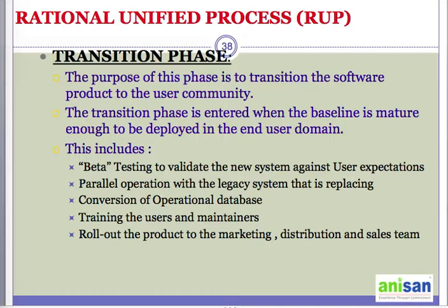Then we talk about the conversion of the operational database. What do you mean by conversion of operational database? Basically, if you are migrating the database, then you may be required to go through this process. Then the training of the users and maintenance. This is basically way before the transition. You may have to provide the training to the users and the maintainers, so that the system stabilizes well in the production environment, and it is easily used by both the users.